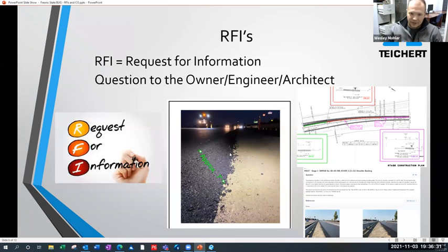We didn't plan on filling dirt up alongside it, right? That's an extra cost. It costs people, a foreman, a crew to go out there and place that dirt to protect this safety hazard. So it's not fair that the extra cost would be put on the contractor, for something that was a plan issue. So in this case, due to the response to this RFI having us go back and put dirt here, that would cost money. So we have to get a change order for that.